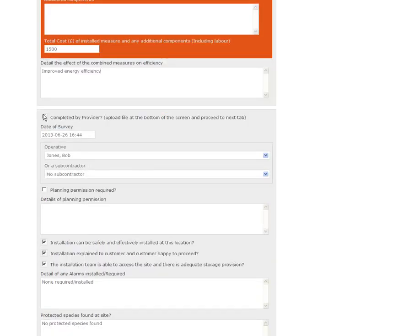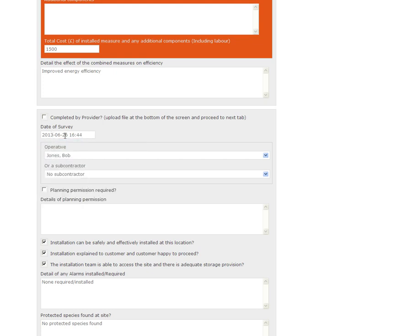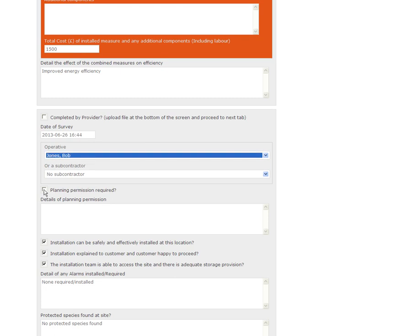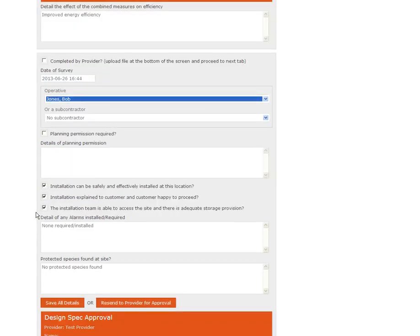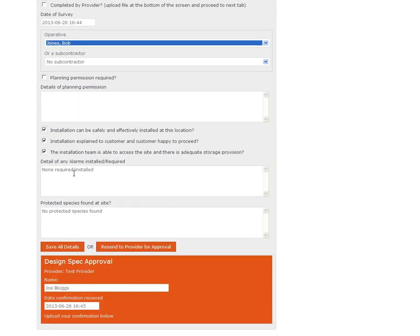Again, if the survey has been completed by the provider you've got the option to tick this button to signify that. I'm saying that we're doing a survey ourselves so I've selected a date. I've selected an operative to do the survey and I've answered all of the relevant questions. These are all part of PAS 2030 so you need to complete this section.